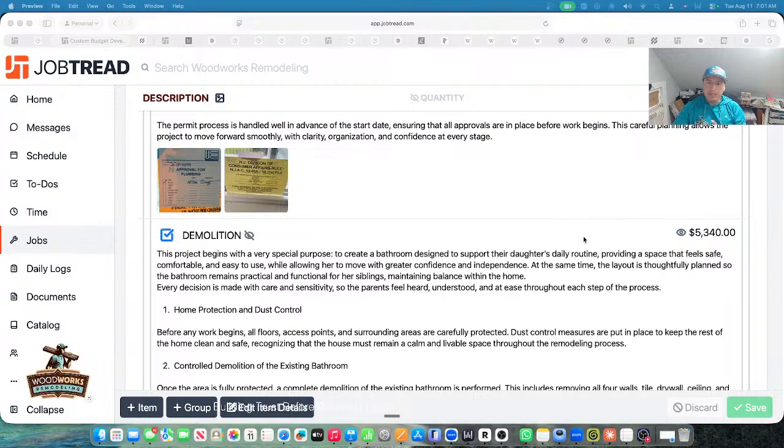Okay, now probably you're asking, what does a net profit look like? We are targeting 20% net profit, because at the end, when everything plays out, sometimes we calculate 5 days instead of taking 6 or 7 days, and then that 20% would really become 10%, sometimes even 8%. But we target 20% net profit at the end of every job.